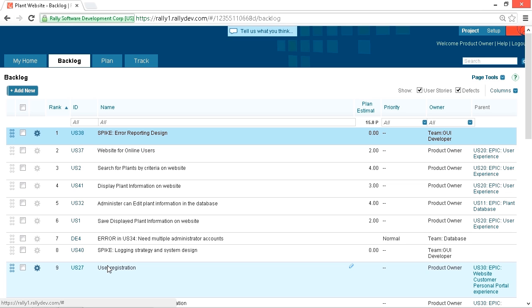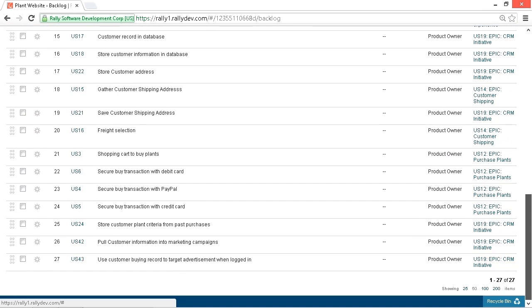Also, anyone can ask the product owner to add a new item to the product backlog. It tends to grow and change as the project goes on, and more is discovered about the project and the customer needs. However, only the product owner is the one that can prioritize where existing or new items fit in to the prioritized list.